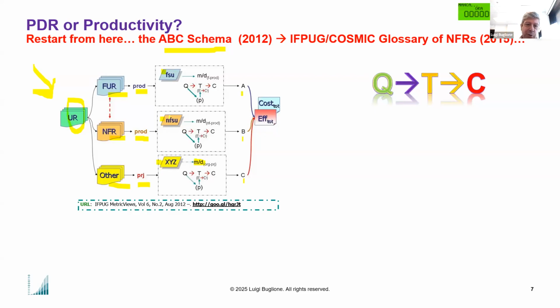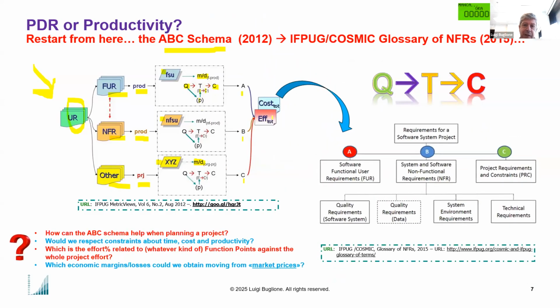About the functional or non-functional sizing unit, often it's possible to calculate it, and in order to determine the time, that is the effort and the duration of a project, we need productivity values or PDR in order to determine the number of man days or man hours, and then according to your technical project to determine the final cost and price for the project. The summation of these three effort and cost figures can determine the boundary, the scope of your project activity.